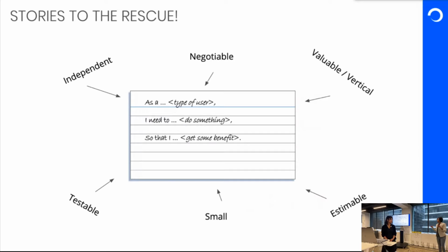You can have a very simple story with regards to login, where you can say just a username and password. Forget about Face ID, forget about fingerprints and all of those things. Those can be different stories. The first one can be just username and password. Then you can create all jazzy stuff around it, right? So stories are the basic building blocks of our whole delivery backlog, right? Some stories are very, very important. Some stories are not very important, right? And they'll get prioritized and deprioritized throughout the event of the project.